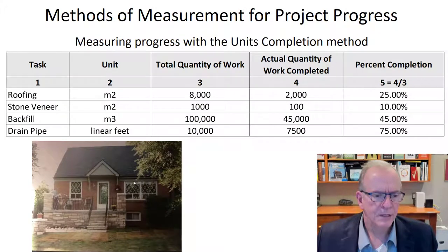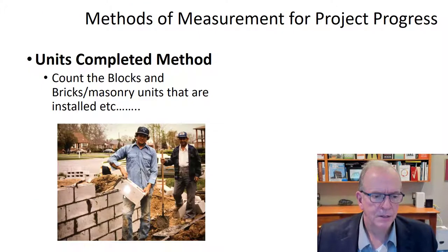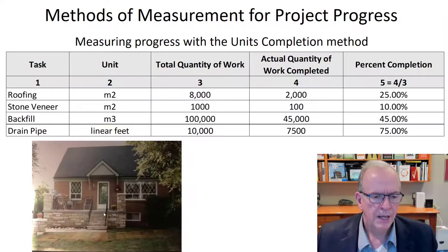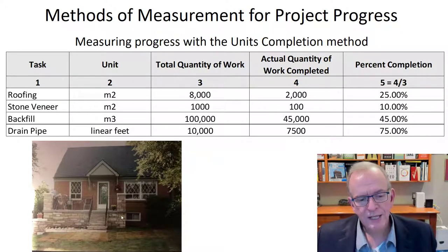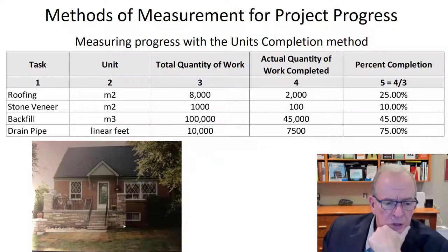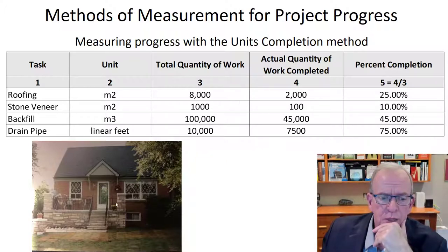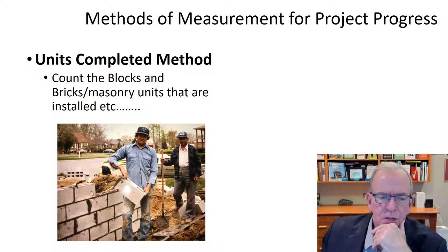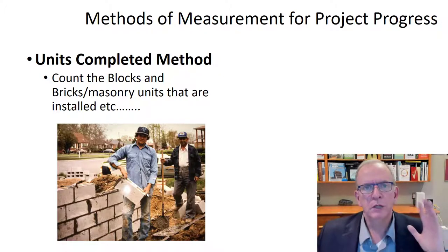Even units, if I go back to this, me laying the blocks on this porch here and the stonework. Well, let's say it's just a small veranda, okay? So just a small porch. But if you know anything about masonry work, doing the columns is a lot more work than doing the straight walls, right? You could say the same thing with a gymnasium wall. You're doing a nice, long, straight gymnasium wall, you can really motor putting those units in.